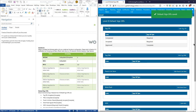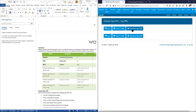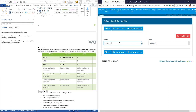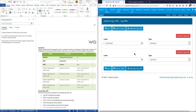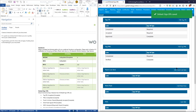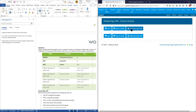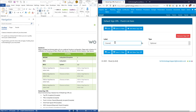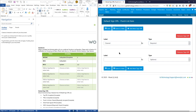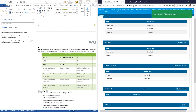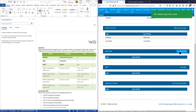Then it's a case of doing that for all the other sign-off types as well. For preservation work list, what we would normally do is: completed — required — and then verified — complete. For punch list data, we would normally go: cleared — required — accepted — accepted — and complete.